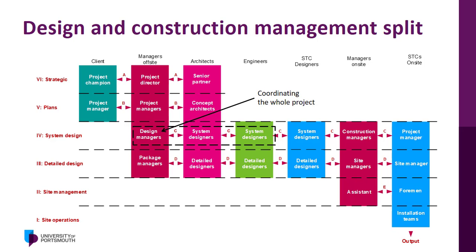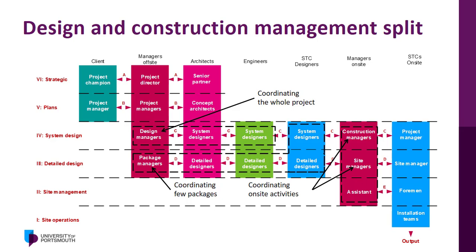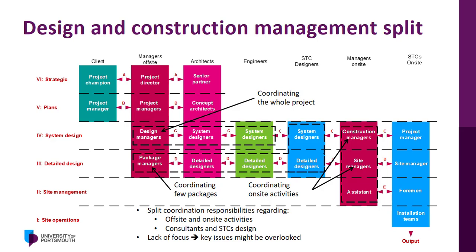The design manager role is concerned with coordinating the consultant's design for the whole project. Each package manager is responsible for the design coordination of their relevant packages. The management on-site role is concerned with coordinating site activities. There is a split between the coordination off-site and on-site activities and between the consultants and the STC's design. This split causes often problems. For example, some important issues might not be communicated on time, or decisions are made in isolation of others.